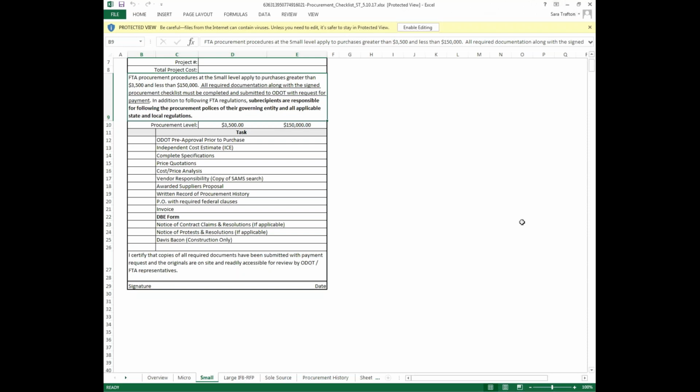So how do I document nothing? Well, I know it sounds a little silly, but you print out the page that says no findings or no results. You do a search of the vendor, no results. That's good. That's what you want to see. So you print that out from the website that says no findings. So that means that you can use that vendor.